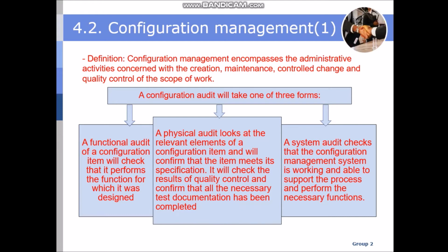The second, a physical audit looks at the elements of a configuration item and will confirm the item meets its specification. It will check the results of quality control and confirm that the necessary test documentation has been completed. Third, a system audit checks that the configuration management system is working and able to support the process and perform the necessary function.